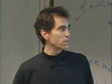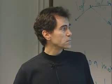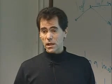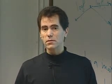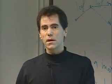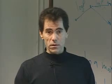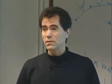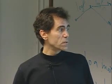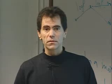Lesson learned, as I mentioned, perform multiple cross-checks, either via test or analysis with a different tool as possible. Another lesson learned is let more than one group perform the review. A lot of times for Chandra, we had the Marshall engineers, but we also contracted SAO down the street to kind of independently assess using their own software tools where we were. That was a good idea because sometimes we had good ideas that we could incorporate and sometimes they had good ideas. But it gave us a sanity check when we both matched and we both felt good. There's also no substitute for direct test or measurement. Analytically, we have wonderful tools nowadays, but they will never take the place of testing.